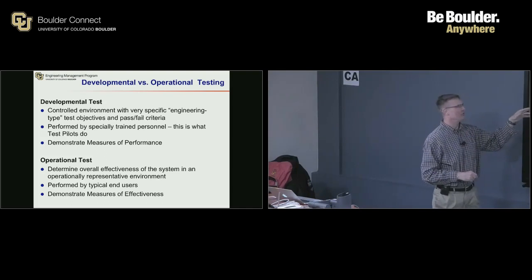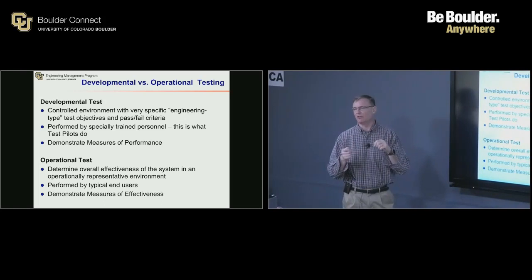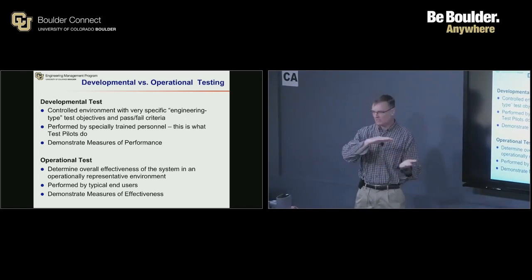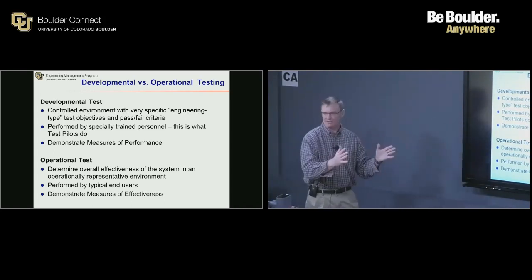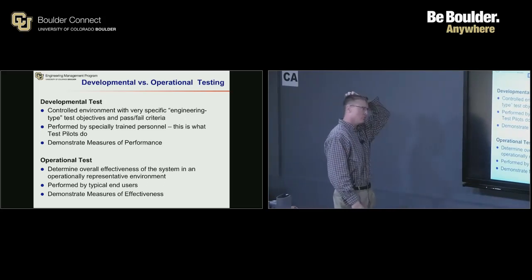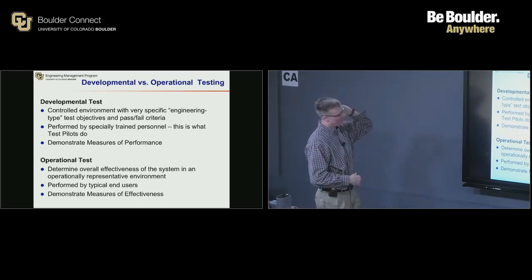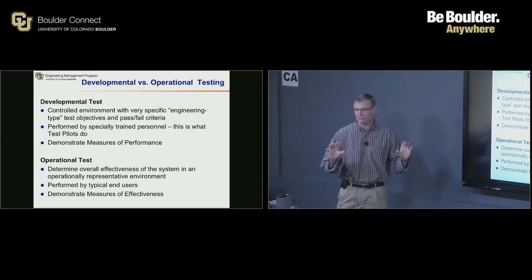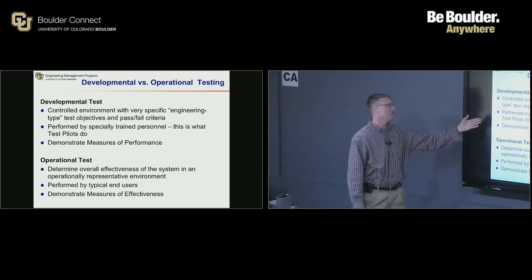Developmental tests are very well described. They're always done in a very controlled environment. So I'm testing vibration only. I'm going to maintain temperature at the same thing the whole way through. When I go to temperature, I'm testing temperature and temperature only, in a very specific fashion. They have very clear pass-fail criteria, and they ultimately are designed to demonstrate that you meet your measures of performance. For airplanes, that's what test pilots do.